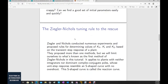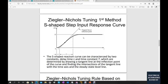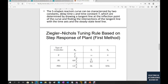This page introduces the Ziegler-Nichols tuning rule, and in this manual it introduces two methods. I prefer to use the second method. The first method is called S-shaped — the idea is we need to measure L and T. However, if you work on-site, because most process values have noise inside, it's hard to accurately measure L and T. So using method one, it's hard to accurately calculate T and L to get the three PID parameters. That's why I prefer to use the second method.